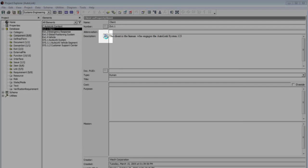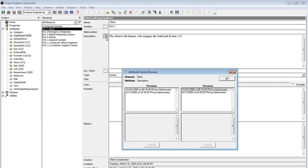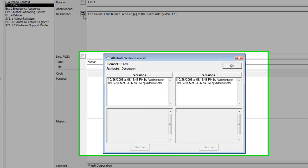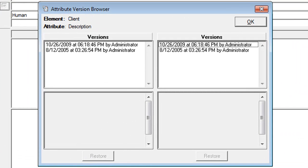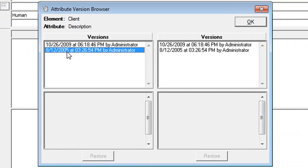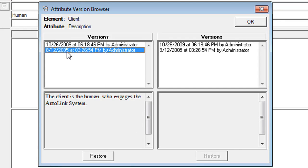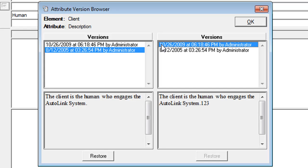When you click on the icon, it will take you to the versioning browser. Clicking on the version will populate the fields below. The version at the bottom of the list is the baseline value. The version at the top of the list is the current value. Notice that the versioning browser identifies the user who made the entry and when. By selecting different versions on each side of the dialog, comparisons can be made.